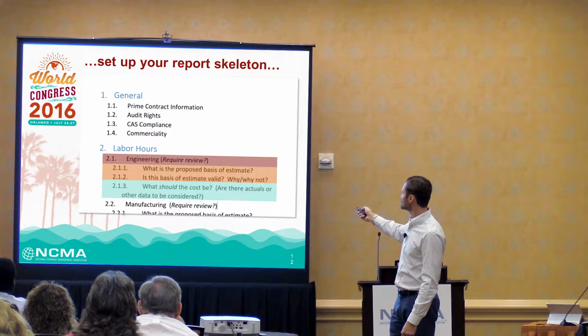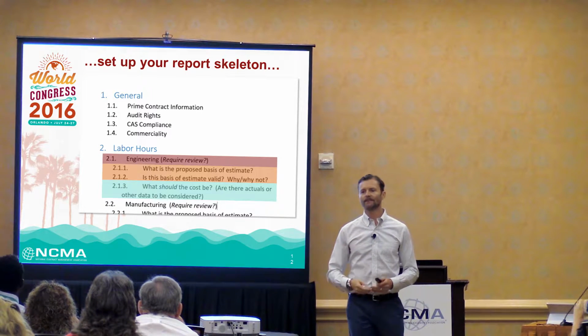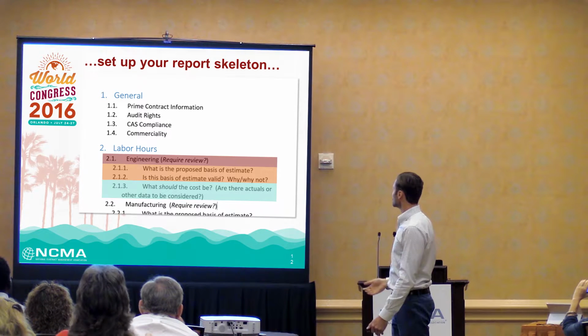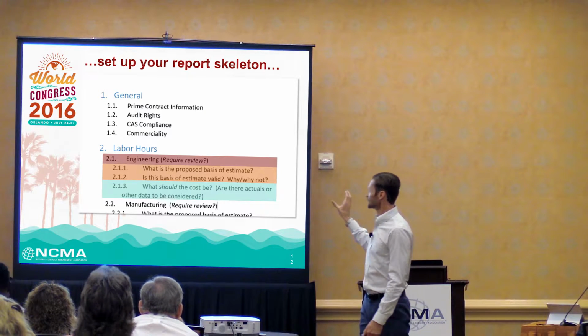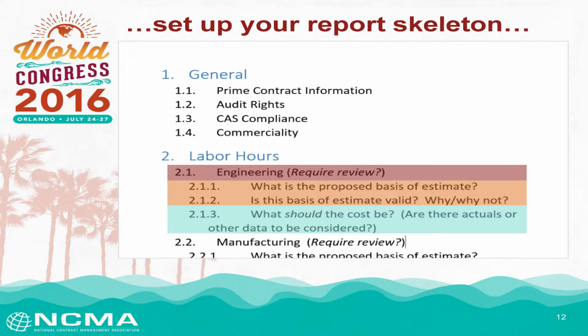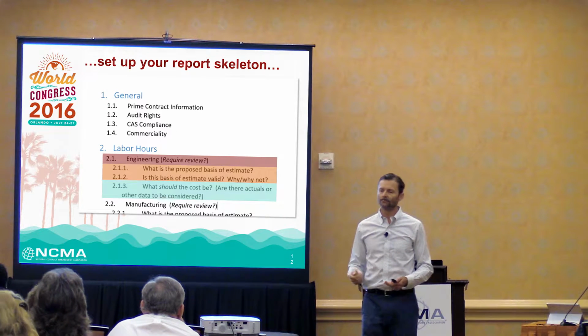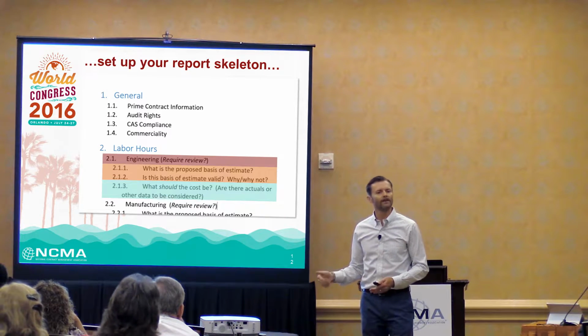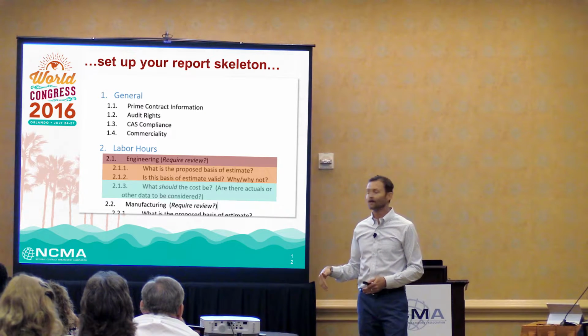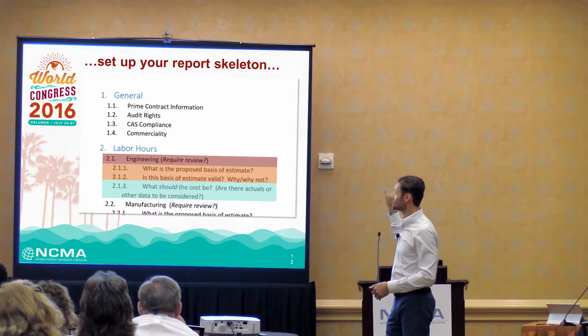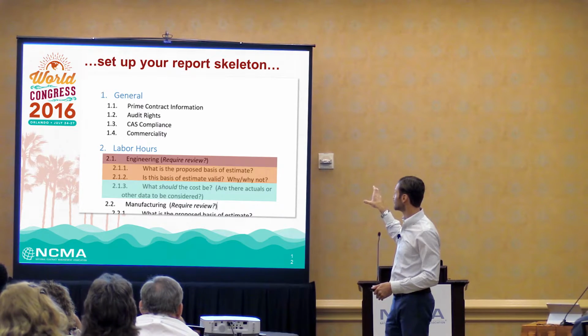So if you go into your cost analysis report and lay out your fact-finding documents, you should be asking that very thing. Engineering, does it require review? Do I need to look at this? That's an important thing. And we'll talk about this in a minute. If they've proposed 3 hours to turn on machines and turn off machines at the end of the day, in the grand scheme of things, this is probably not where you should be spending your time. So that's an important question to ask yourself. Do I need to be actually looking at this in detail or not?